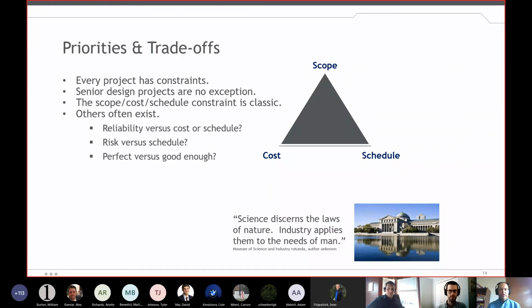As an engineer, the questions I ask are, what is the definition of done? How long is it planned? And how much effort was planned to get it there? So when's it due? How long is it going to take? And what is the definition of done? If those don't add up, then there are some discussions you have to have about what makes sense. That's a useful endeavor, because getting something that's good is sometimes better than having something that's perfect, because you can achieve some needs without achieving all the needs. So keep that in mind: if you get boxed into a corner, sometimes the question is, what can you trade off to get yourself into a situation where you have something that is good enough.